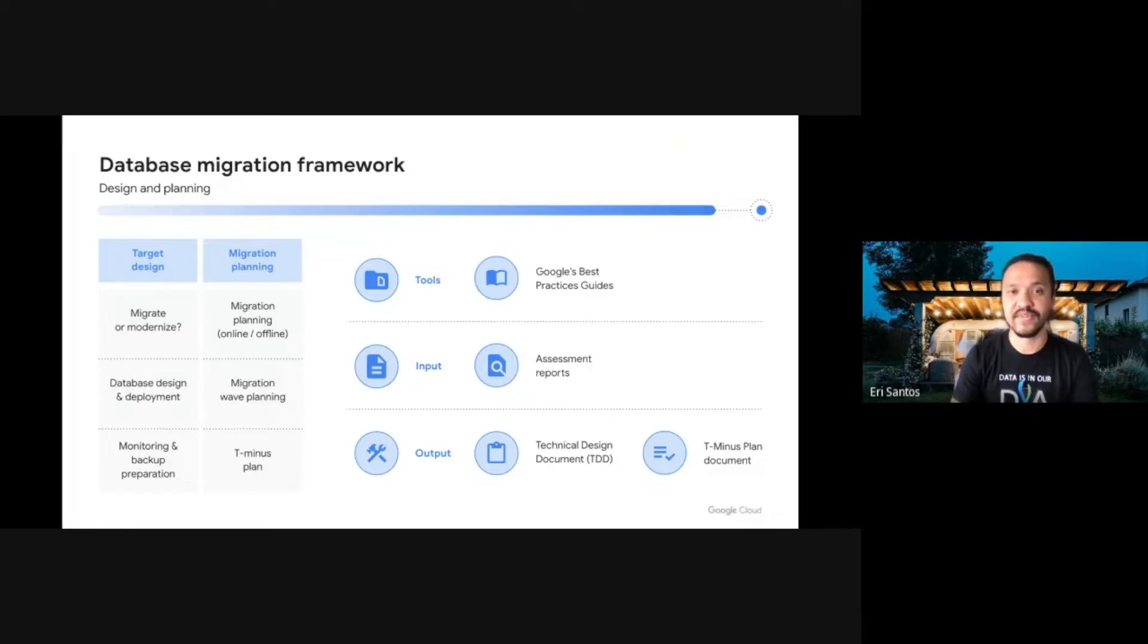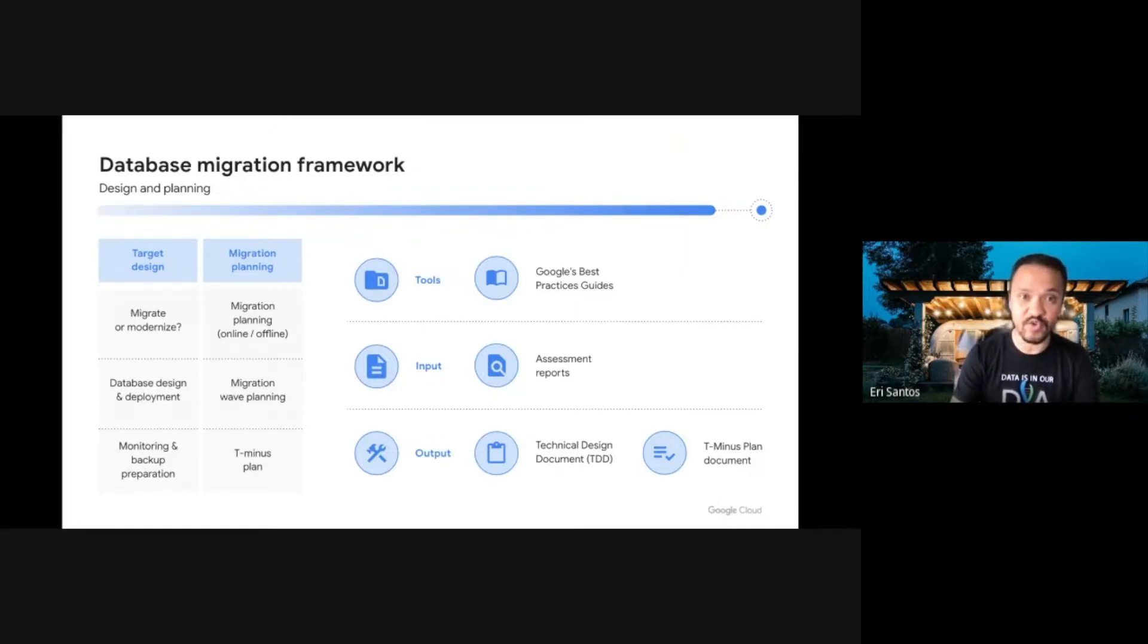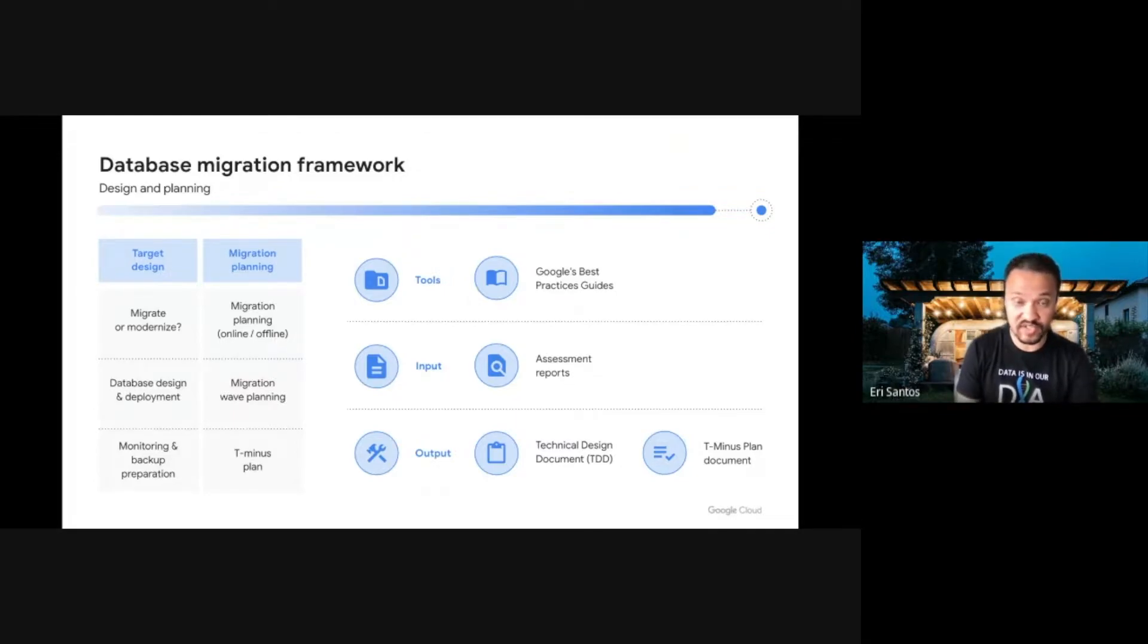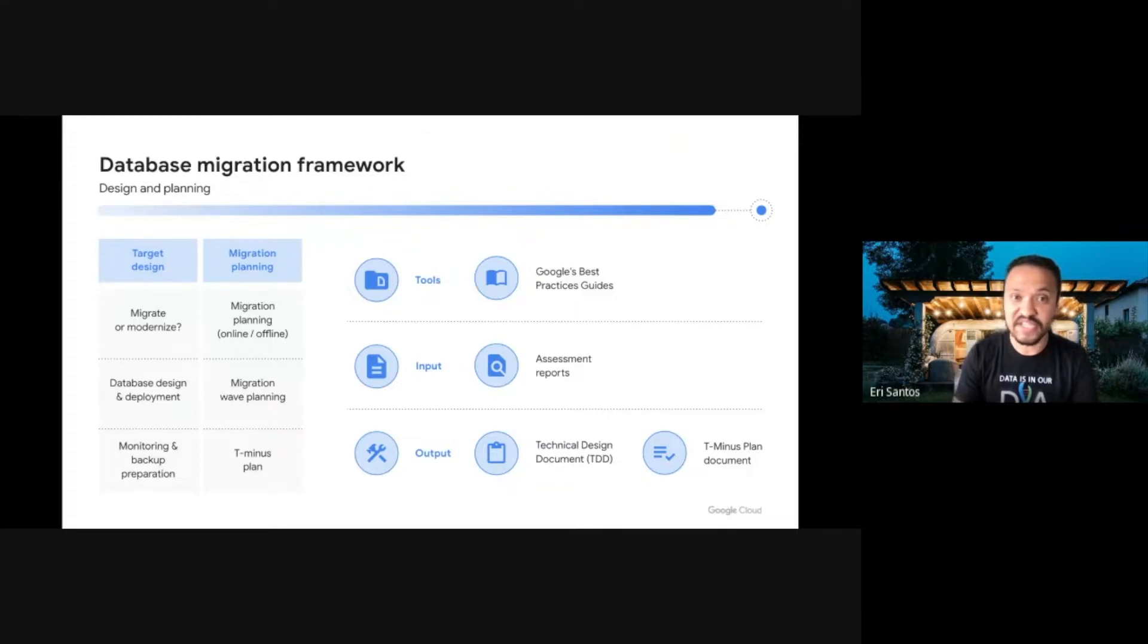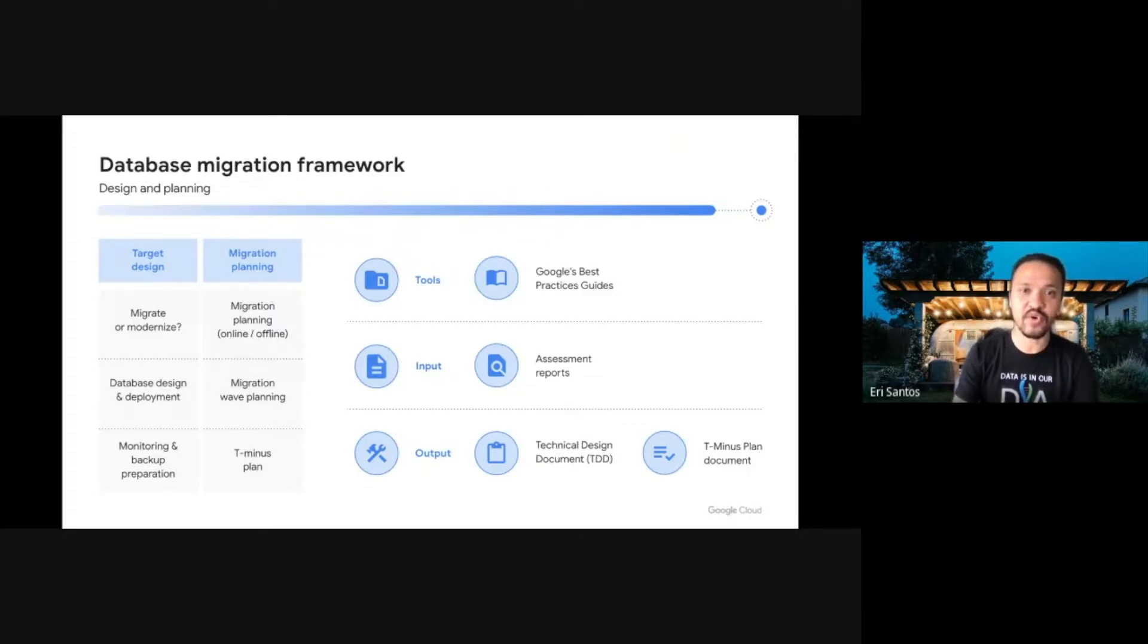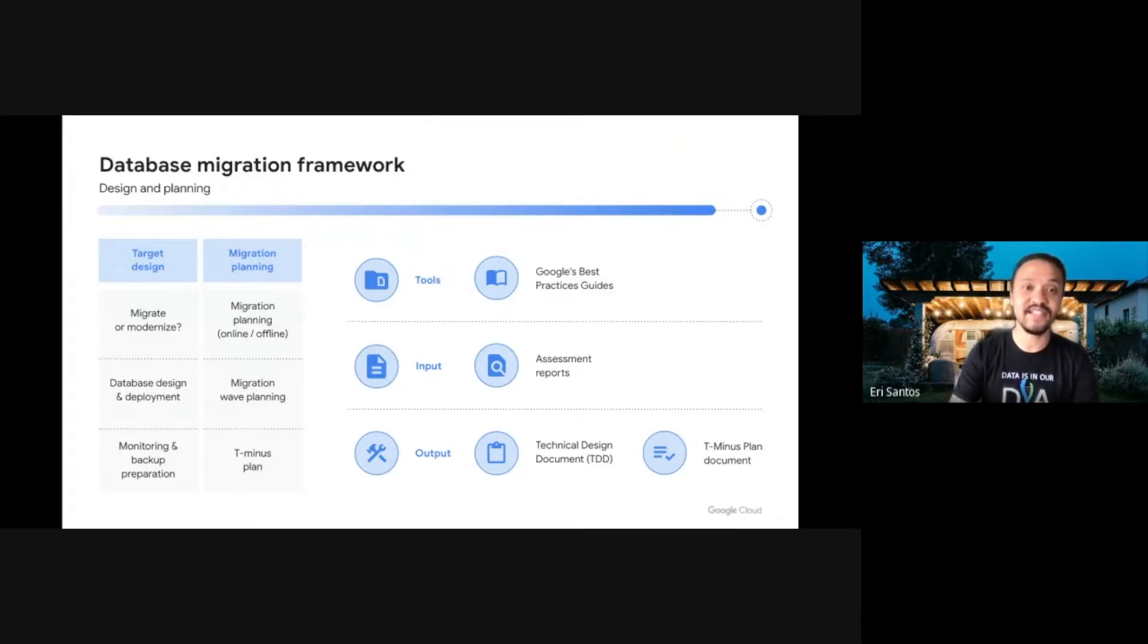I'm sure this demo was very helpful to showcase the Stratozone abilities to assess a database. Now, let's explore the next phases of the migration framework, target design and migration planning. The assessment report will be mainly used for technical design decisions, migration efforts estimation, definition of archetypes, if we are migrating hundreds of databases, technical limitations and eventual restrictions. It is in this phase we make sure all your company's and Google Cloud's best practices, standards and architecture frameworks are applied. As a result, a TDD document along with the T-minus document is created.